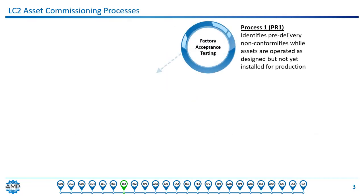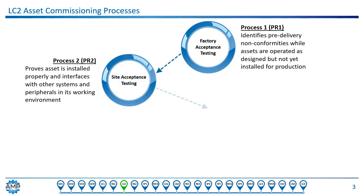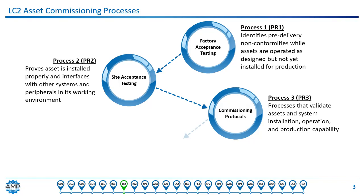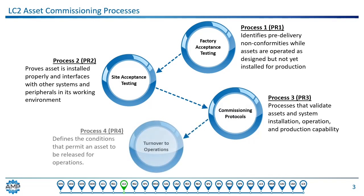There are four processes associated with asset commissioning. The first is factory acceptance testing, which identifies pre-delivery non-conformities while assets are operated as designed but not yet installed for production. The second is site acceptance testing, which proves that an asset is installed properly and interfaces with other systems and peripherals in its working environment. Commissioning protocols, the third process, validates assets and system installation, operation, and production capability. And finally, process four, which is turnover to operations, defines the conditions that permit an asset to be released for operation.